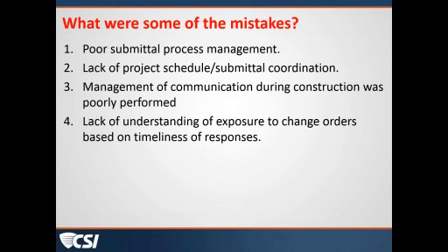Maybe there should have been a pre-installation conference. Maybe there should have been a mock-up. So those things could possibly be included in the project general conditions or supplementary general conditions. So a lot of things that we don't know details of there, but managing communication during construction in a better fashion may have avoided this problem altogether.